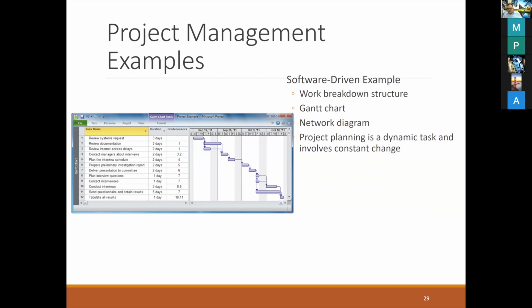For example, some of the students say that they spend around 2 months for development, but the advisor said that actually this project should be finished within, let's say, 3 months, so that for the other month the student can spend their time for testing and developing the documents, doing the documentation. So when they see the Gantt chart, they know immediately what piece of task caused the delay for this project.